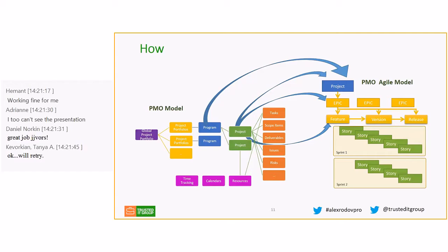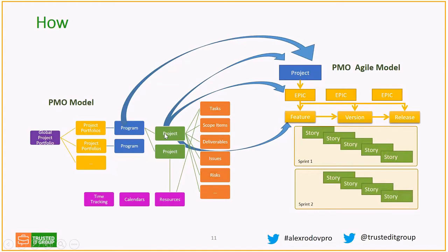But basically there are the first two or three layers of the hierarchy on the agile side. On the agile side, you can still preserve a consistent hierarchy underneath, by knowing exactly which story in which sprint belongs to which version or release, and therefore which epic. So you can build your PPM environment where portfolios are linked at a certain level with your agile objects like epics, themes, features, versions, or releases. Okay.